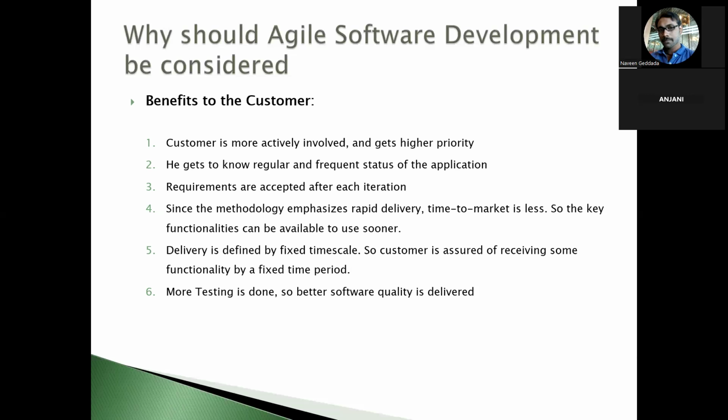Now in iteration 2, we are delivering R4, R5, and R6. When we deliver these, the functionality from the first iteration, R1, R2, and R3, also needs to be tested, because R4, R5, and R6 have a dependency on the first three requirements implemented in iteration 1.